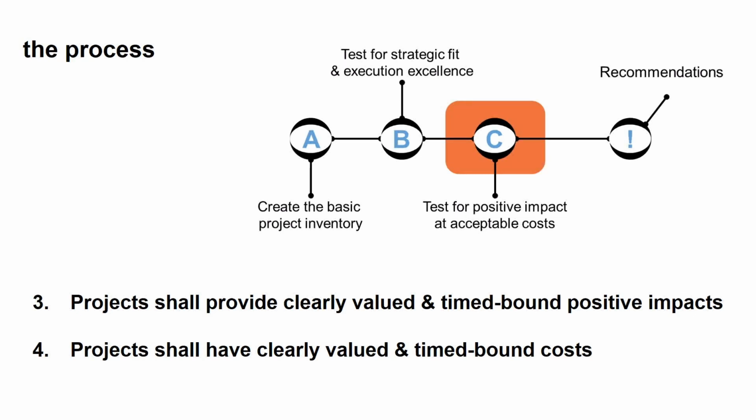An example of rule number 3 was to say, okay, what are the tangible impacts and the intangible impacts of your project? And here, the proof point was the hardest to get. Prove that by doing your project, you're actually going to get the outputs that you're saying we're going to get. You know, we've all seen projects on project starters when presenting to get a budget saying, I'm going to come up with 200 million savings. The margins are going to go up by X%. This is going to have X% impact on sales. Okay, prove it. And this proving exercise turned out to be very challenging for the project leaders, and they hated it for us, obviously.